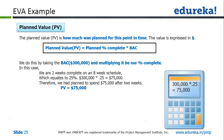How did we arrive at that? The total duration is eight weeks. We did work for two weeks — that means 25% of the time is gone. And in 25% of the time, we were supposed to complete work worth 25% of $300,000, that is $75,000. So we get the value for our first element, that is PV.